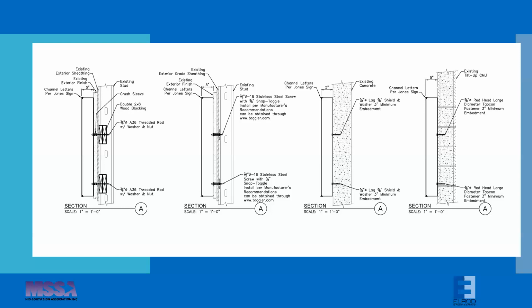And so we put together these drawings for all the different types: steel studs, solid concrete walls, concrete block walls, wood studs, and that way we pre-engineered it all. We had all the examples. They could send hardware that they need to their installers, and they could permit the conditions with a little bit of flexibility there, so that they didn't have to change things if things were slightly different than they were expecting. Obviously, there are more wall mounting conditions than just these 4, and so there were custom applications, but this greatly simplified and was applicable to a large portion of the sites where they were installing.